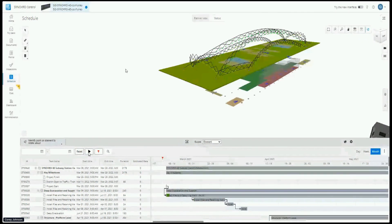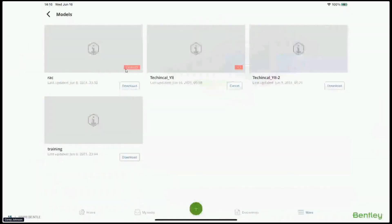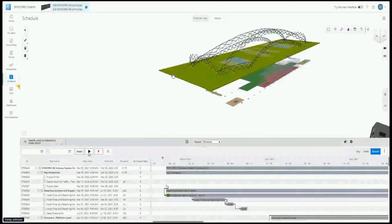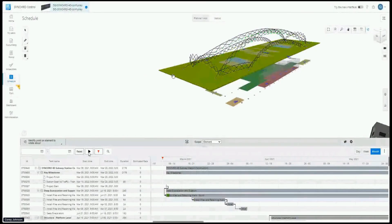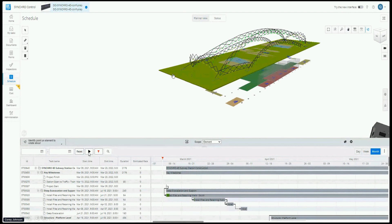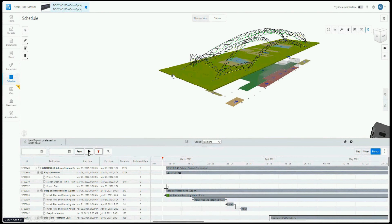Yeah, when you set - when we were back in one of the earlier videos they were setting in - you can choose the values to track progress against, whether it would be a surface area, volume, percentage complete. You can have it do the calculations on it. You can set predefined 25, 50, 75 percent complete, or physically type in a number of how many cubic yards were poured. A lot of flexibility there.